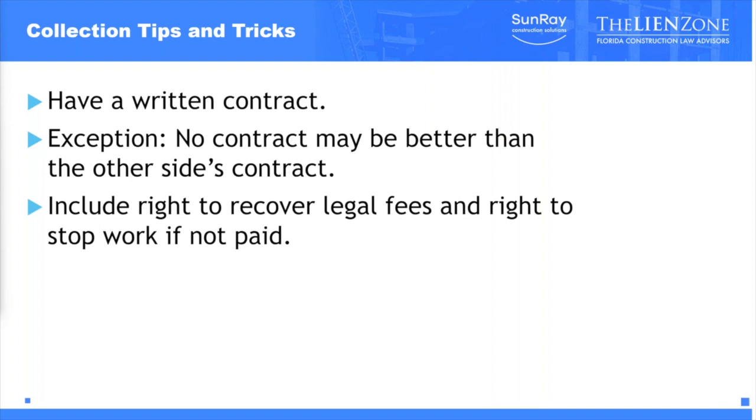What do you want to make sure that you include in any contract? There are 3 things at a minimum. Number 1, the right to recover legal fees and costs if you have to sue to get paid, or if you are being sued and you have to defend yourself. So having the written right to recover legal fees is important.